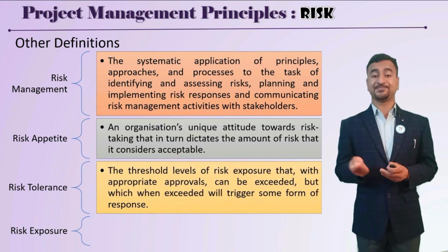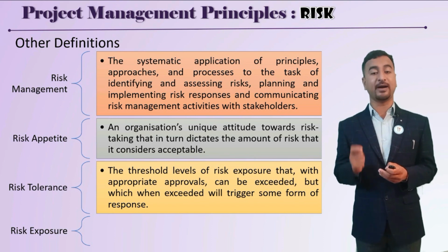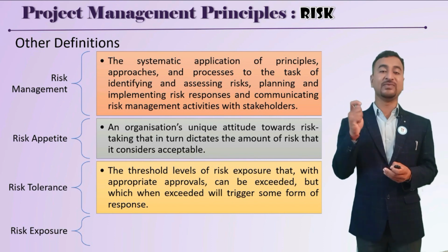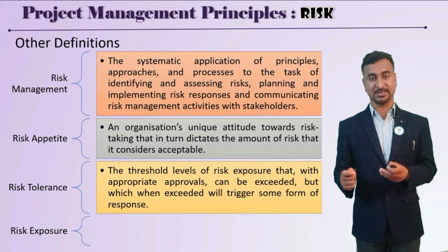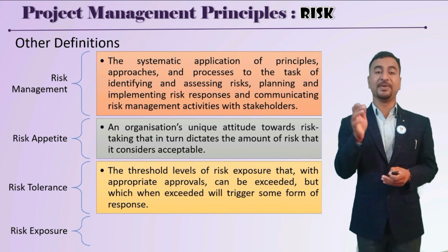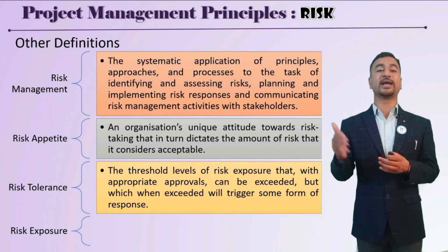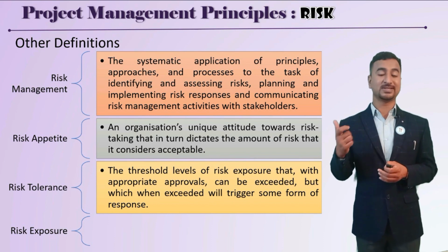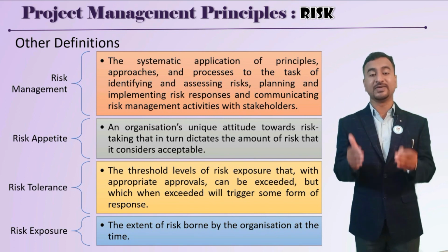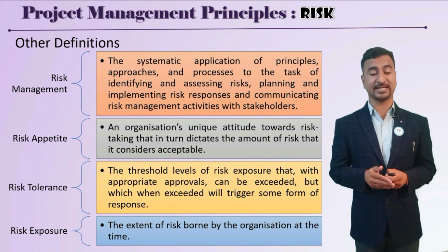Then risk tolerance is the threshold level of risk exposure that, with appropriate approval, can be exceeded, but which when exceeded will trigger some form of response, that we call the risk responses. So that is the risk tolerance level. Beyond that, you cannot go with that risk, you have to take management approval. So that is risk tolerance. And finally, risk exposure is the extent of risk borne by the organization at any given point of time, that is risk exposure.